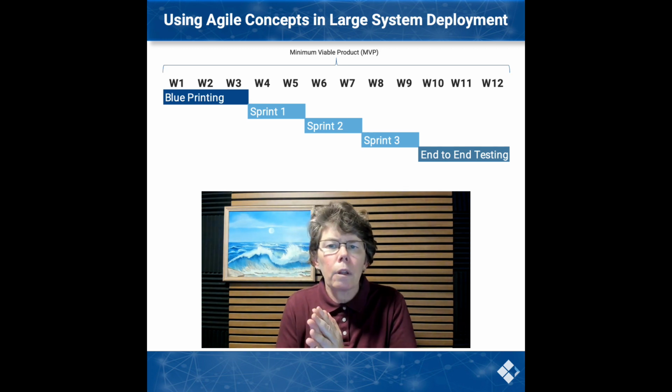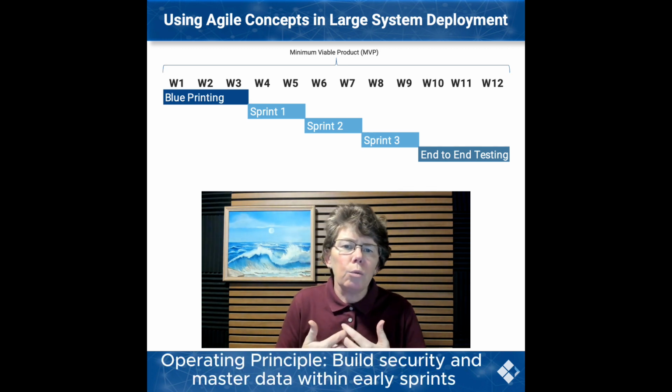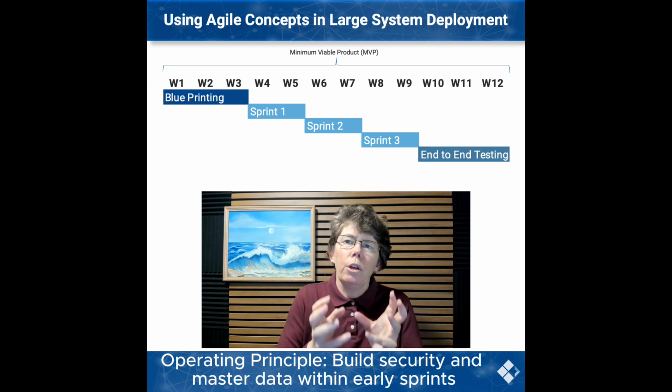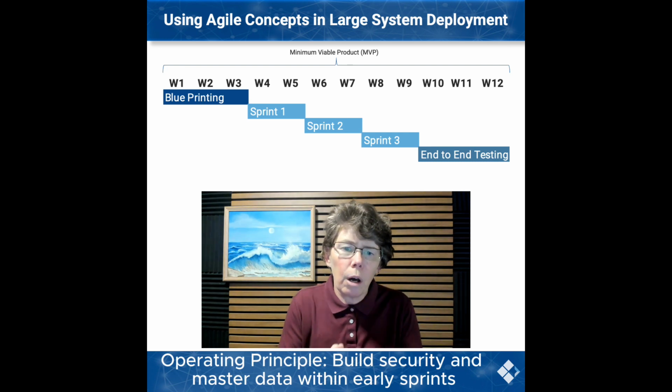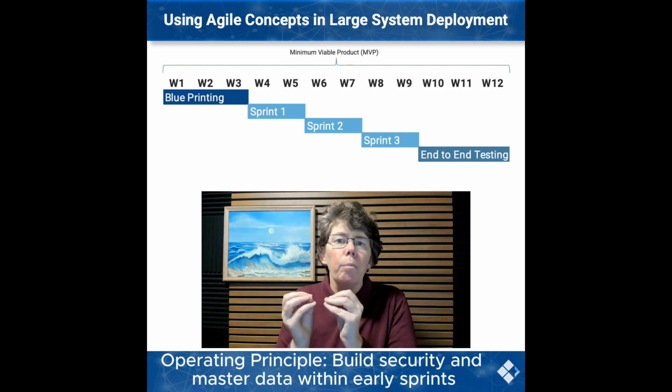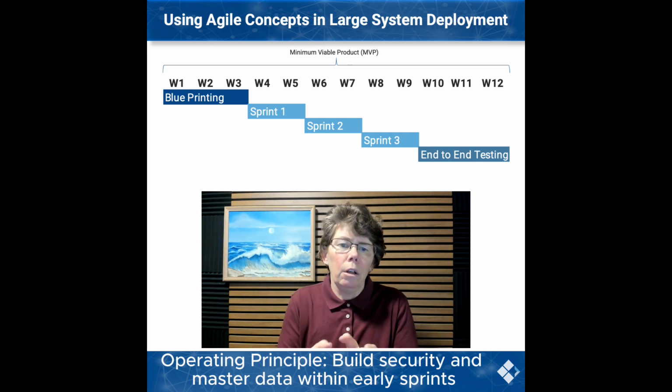It is a great tool. At ClearIQ, we'll often tell you, make sure in those early sprints, you build the security model that you're going to use, and you build in all of your master data. We've been involved in many projects where both of those things would get retrofitted at the end in the last sprint. And usually that didn't bode well because, oh, we forgot about this. Oh, we forgot about that.